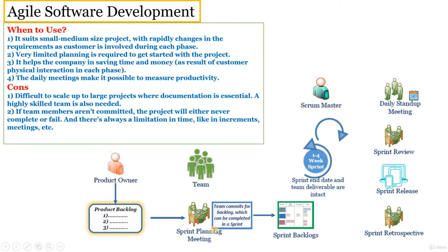When I say sprint, it can be a 2-week sprint or 3-week sprint or a month sprint. It depends on what their organization says and what the business basically demands. So once they are done with the planning, then that would go to sprint backlogs. Sprint backlogs are essentially what they have committed to within the sprint.